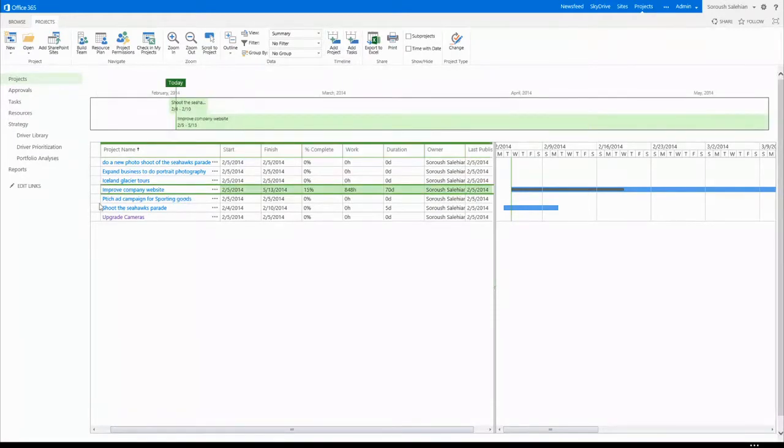So you can start building up these ones next to each other. So you have an overall report of how your projects are stacking up together, when in time each project is going to come up. And if there's a specific milestone in each project that's important to you, you can also go into the project with this Add Task button, and it will open up the project. You can pick a milestone and bring that and start showing it on your schedule. So there's really no need to create these master projects to be able to track all these things. You can just do them here and use a timeline in the project center and the project center views to create that aggregate of everything.